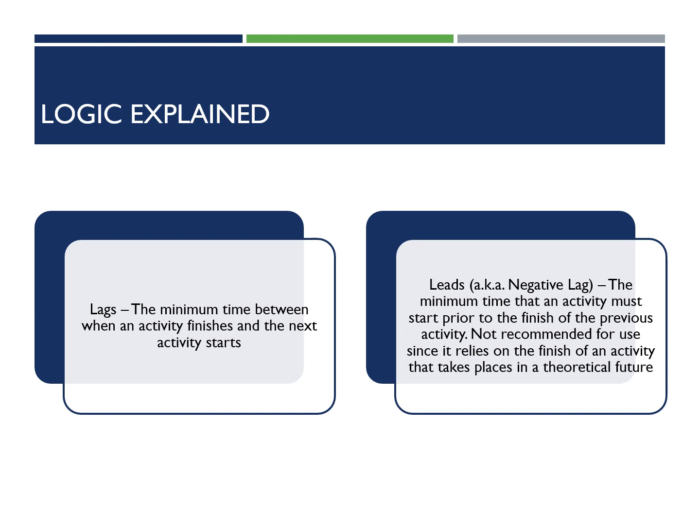It's totally an acceptable practice to use lags. And what that essentially says is activity A is going to finish, and then 3 days later, activity B is going to start. So you can put a 3-day chunk of time in there. This is handy, like let's say you finish a concrete pour, and 28 days later you're going to have your final test break. Okay, it's totally acceptable to use lags in practice.